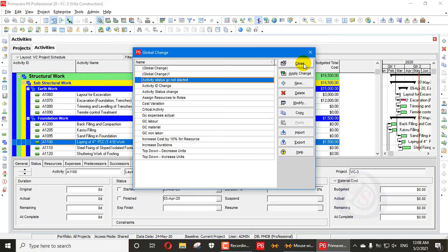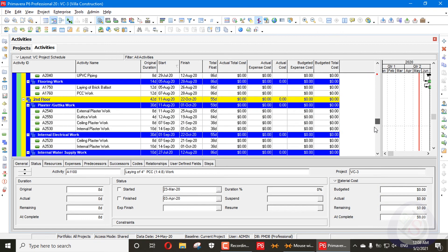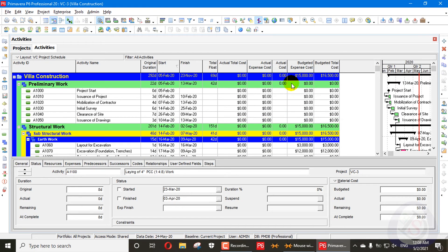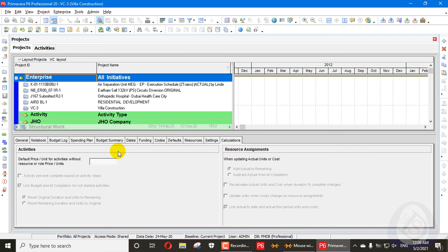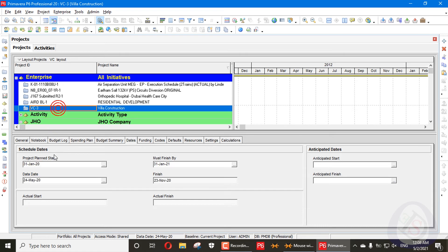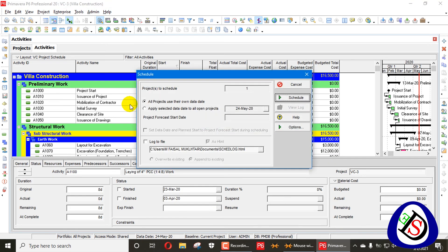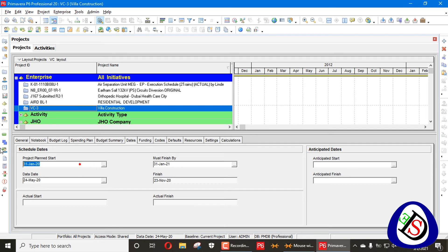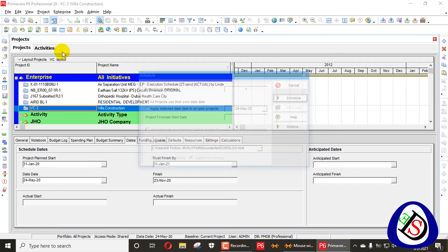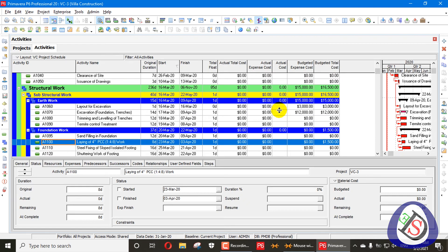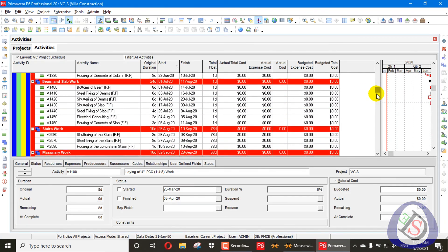Five global changes have been created and applied in just a short time — you can do this for 1000 activities in just a few minutes. Go back to the project, check the project start date — it is 1st January. The data date is 24 March. Go to Activities, press F9, apply the data date, copy and paste it, and schedule. The project is now scheduled back to its original state with the critical path visible.